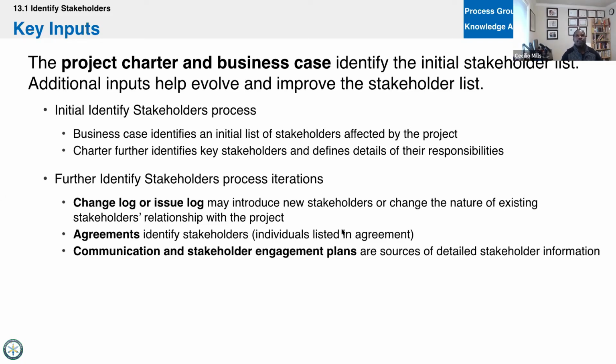Okay. And they're going to say something like, you're a project manager for XYZ project, and your project is about 80% complete. The company has hired a new executive and your project will impact them tremendously. You should, and it'll say A, collect their requirements. B, inform them of your project. C, add them to the weekly status report. D, do nothing. Your project is almost finished. What are you guys going to do? A. You're going to collect the requirements. You're going to take the most action, right?